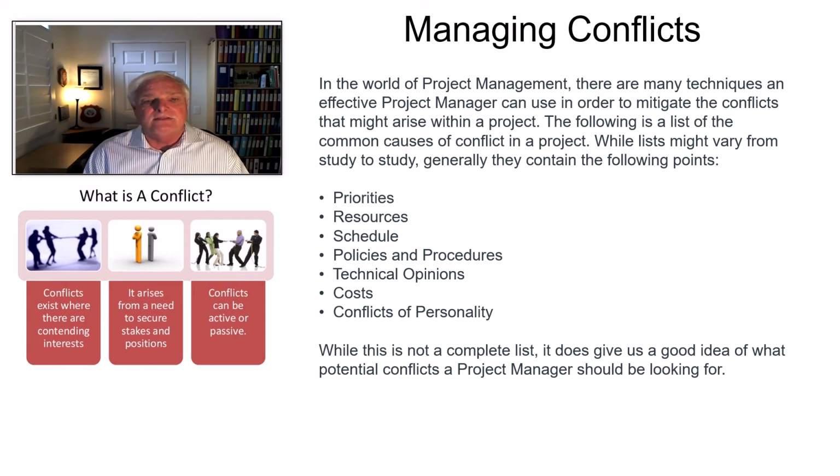And typically, there are certain things that drive conflict. One is priorities, where you need to be in two places at the same time. Where your priorities are split, you may have another project or another program that's pulling at someone, and they are trying to do something else associated with where they're at. So you may have limited resources. Schedules may be too, I'll call it aggressive, and that people can't get things done. This can cause it. You can have policies and procedures that have gone out of date or are unclear.